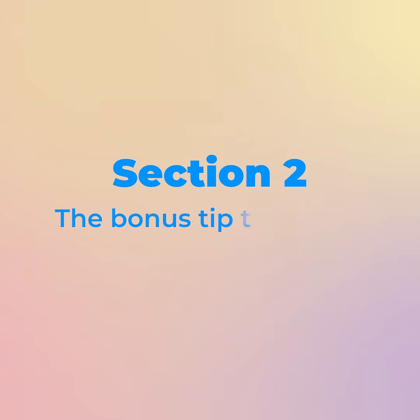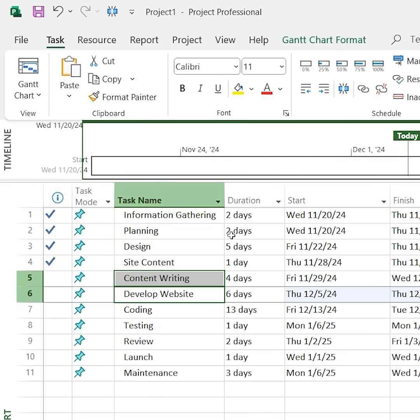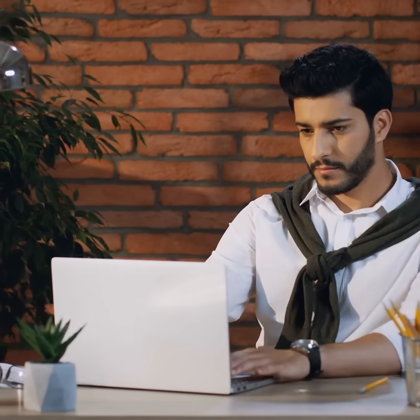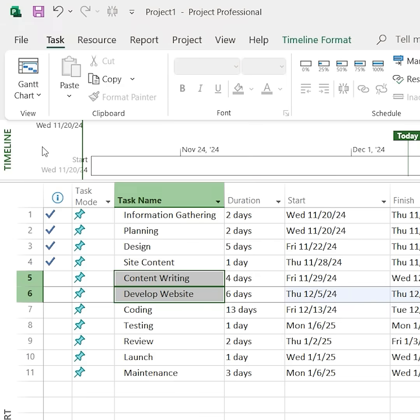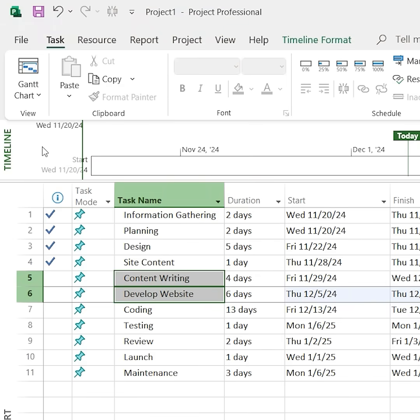Now the bonus tip to handle last-minute changes. Enable auto-linking so new tasks automatically link up. Without auto-linking, inserting a new task can break the flow. With auto-linking, dependencies form automatically around new tasks.